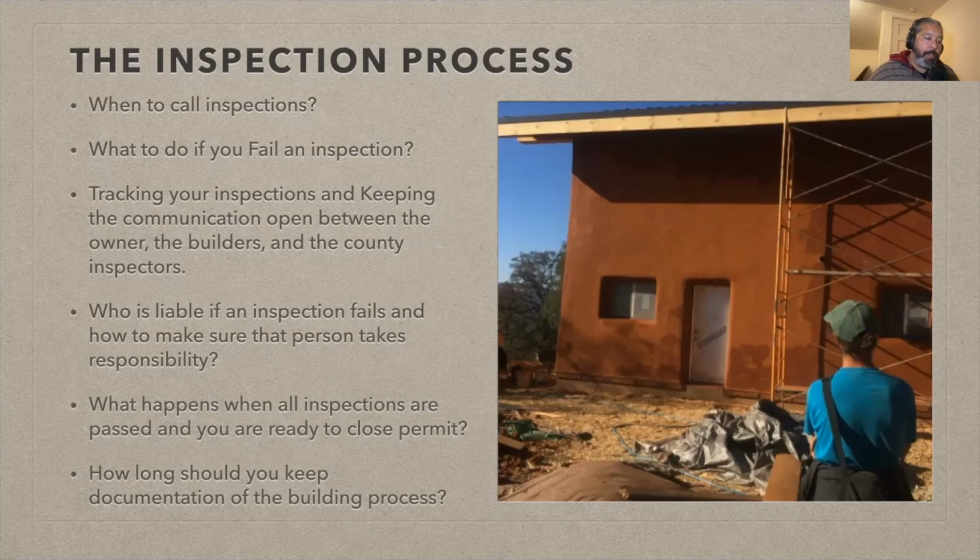So, how long should you keep documents of the building in your possession? The building process has lots of steps. You have lots of manuals, so much information, plans, permits, all this stuff. It really does matter, so you want to make sure you keep it somewhere safe. You want to keep it for a minimum of 10 years, but really you should keep it for the life of the home until you sell it, because you want to give those documents to the buyer. So, don't lose it.